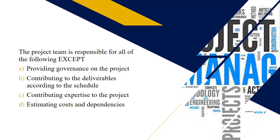Next question: the project team is responsible for all the following except which one? Hopefully you selected A — providing governance on the project is the responsibility of the project management office, the PMO, not the project management team. The project team is responsible for contributing their expertise, contributing deliverables according to the project schedule, and estimating task durations, costs, and dependencies. That is the distinction between the project team's responsibilities and those of the PMO.